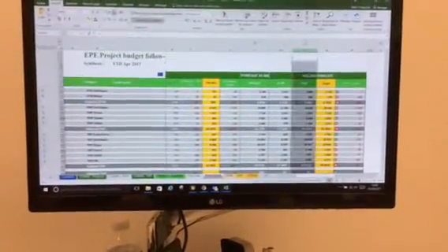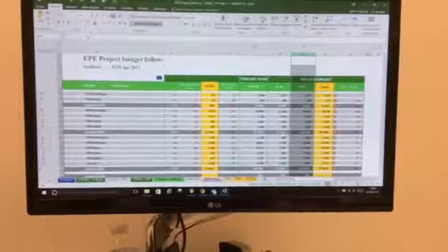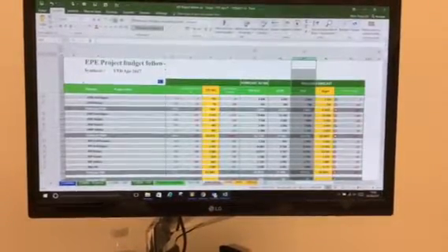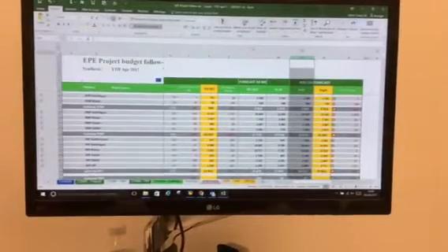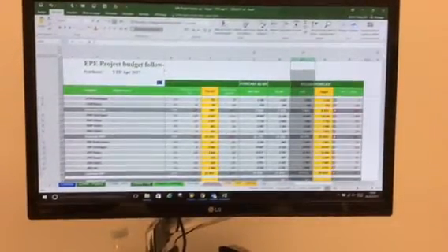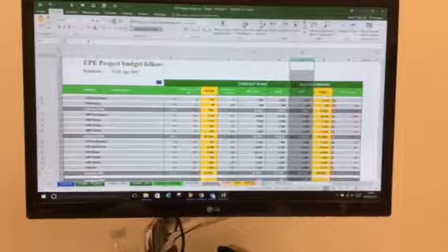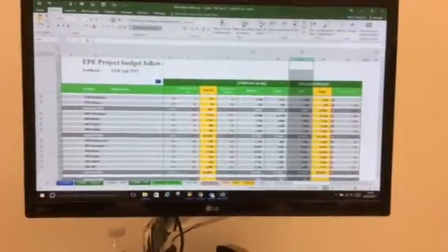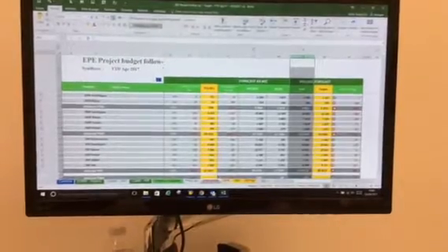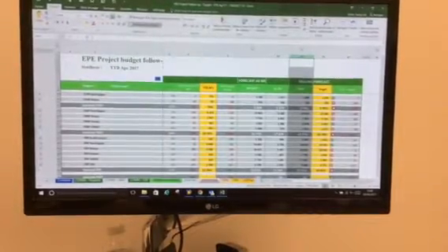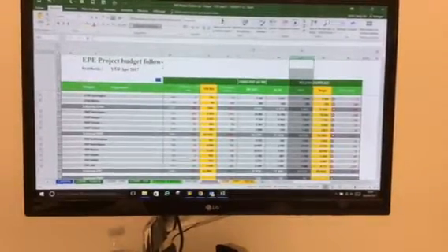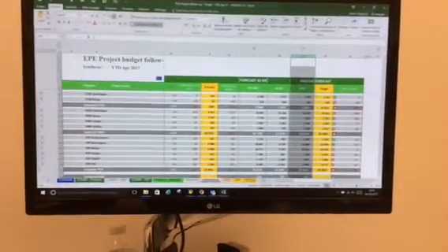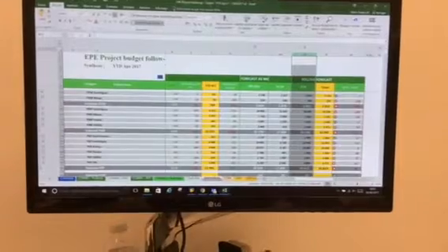So what is the full year forecast? The full year forecast is calculated with the actual cost until now plus the forecast for the remaining period of the year. For example, when I say that we are at the end of May, I have to take into account the cost we actually spent from January to May plus the forecast from June to December, in order to capture all the evolutions.